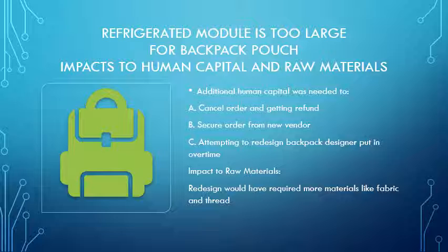Because the potential for issues with vendors has a high probability of happening and significantly impacts the overall project, these types of situations were already planned for. There was additional human capital required, but the backup plan was able to be implemented without affecting the critical path for the project. The team of designers took a couple extra hours when the issue was discovered to determine if a feasible redesign could be implemented.